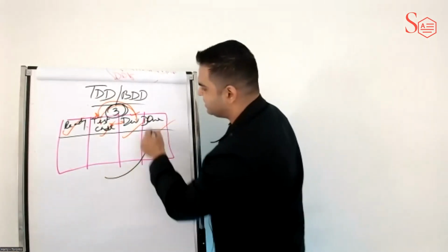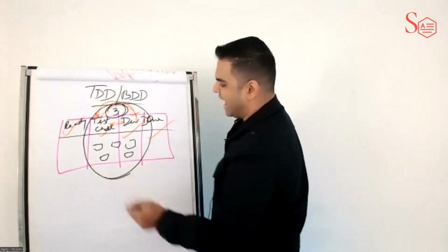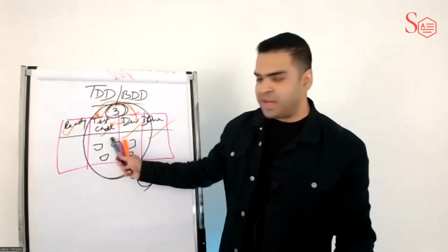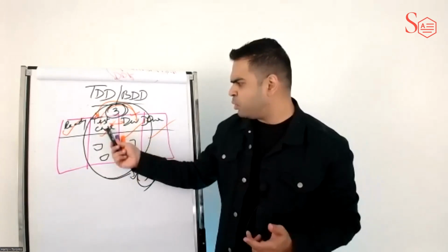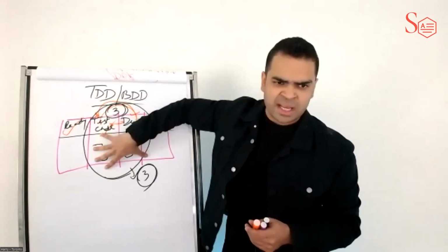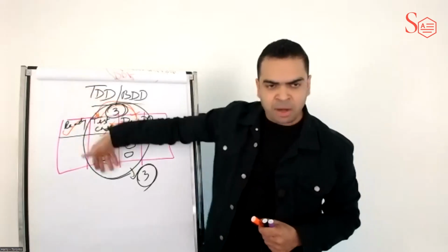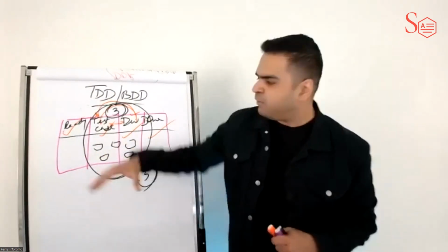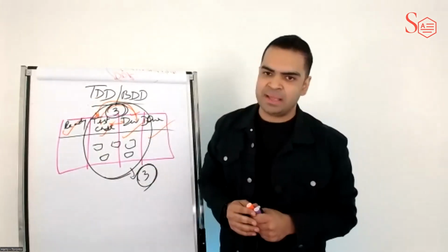So for example, if this team agrees that the total of stories in between these two Kanban columns is going to be a maximum of 3, that means that as soon as we have 3 stories in any of these Kanban columns, or collectively, sometimes we can put WIP limits on each column, or we can put a consolidated WIP limit for 2 columns as well. So there's no specific rules on how it should be done. Many teams use a WIP limit per column. Some teams use it for the entire in progress section. I generally prefer the entire in progress section. Reason being, it helps us reduce the WIP in this entire team.